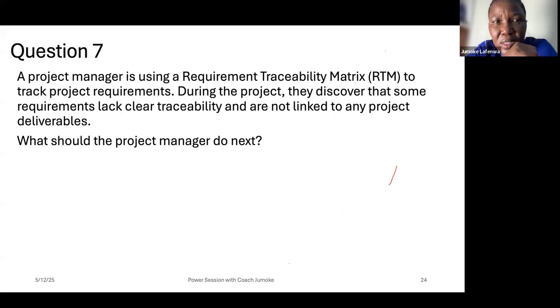And you know that the budget you have or the initial scope in the charter, even if, let's say, you don't have a written charter because it's a community and they are not literate, all right? You can document whatever they are saying and take it to be the charter. You can't trace the helipad to anywhere in the project, one, because of the cost and everything. So you will gently tell the person, oh, to have a helipad is nice, but this project will not answer to that for now.